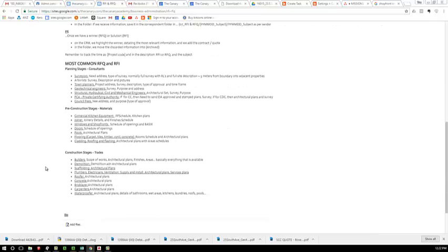Now, finally, I'd like to talk about the most common services or the most common situations. So normally on a planning stage, we have surveyors for the survey, which is key, and that has to happen at the very, very beginning of the project. Arborists, town planners, geotechnical engineers, that is very common, so we can prepare the DA or the CDC.